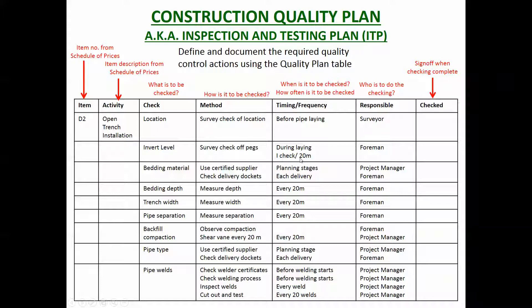You can do the same thing for a consultancy project. Instead of open trench excavation it might be preliminary design, and the checks might be: does it meet the client requirements, are the calculations correct, has the drawing been produced to the required standards — for example, councils have a specific way they want drawings presented. A consultancy project can use exactly the same format for a quality plan. Note that construction companies often call it an Inspection and Testing Plan, or ITP, so you need to be aware of both terminologies.